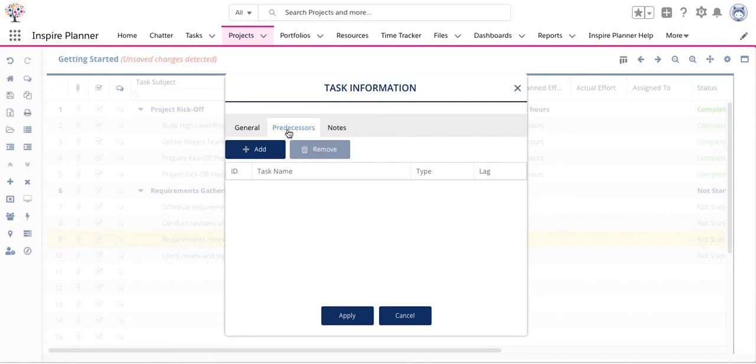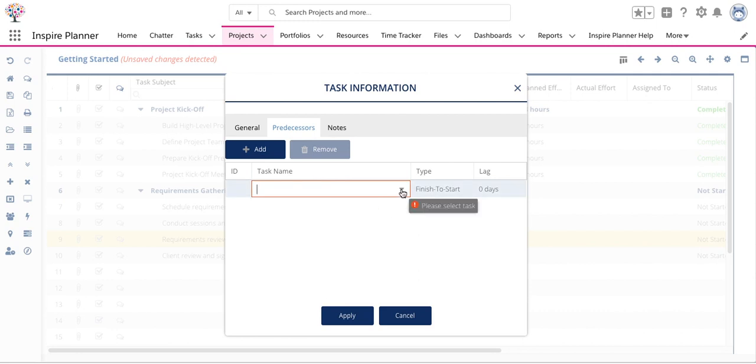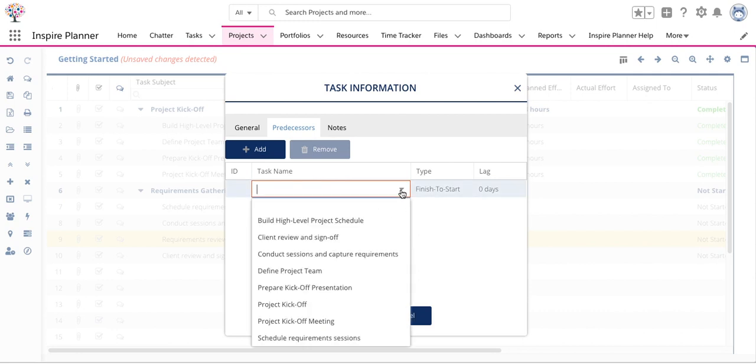Just click on the predecessor tab and then click on add and you'll be able to choose your predecessor task from an alphabetized list of all of the tasks in your project.